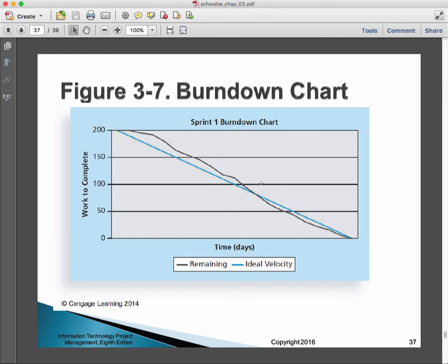Something that would be kind of easy, that team 2 could do quickly, we might say has 5 points. Something kind of middling might be 10, or something kind of hard could be 30 or 40. What we're trying to do is get an idea about how much effort is in these things, but we don't want to go so far as to do person days.